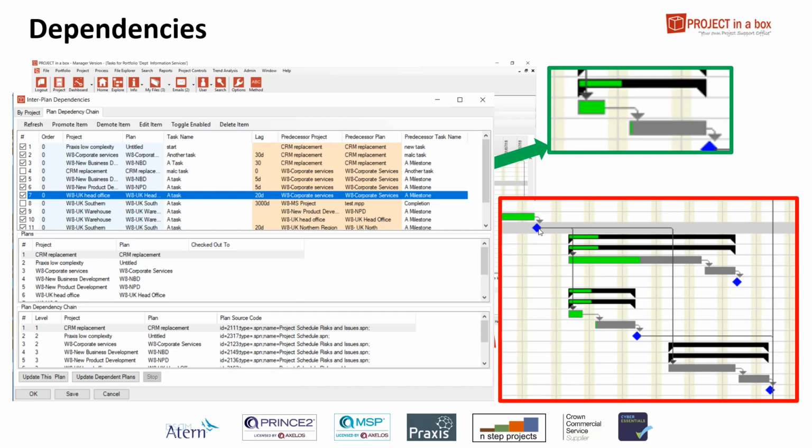That's the case for planner files. If you've got a Microsoft Project file, it can be the feeding out one. So this could be coming from a Microsoft Project file, but when you're feeding in, it must be a planner file, and that's because we have to be able to open that file programmatically, reschedule it and close it again, and we can't do that in Microsoft Project.